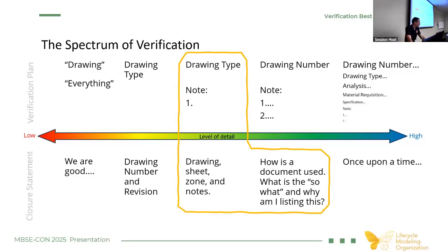So identify the drawing, identify those boundaries for what the verification is actually going to look like. And then can you identify the sheets, zone, page, sections, whatever the case may be, in the final objective evidence, and can you explain it? And if you can do that, then I'd say the litmus test is probably pretty good, that the requirement's reasonable, the systems engineer understands it, and you've probably implemented it effectively.